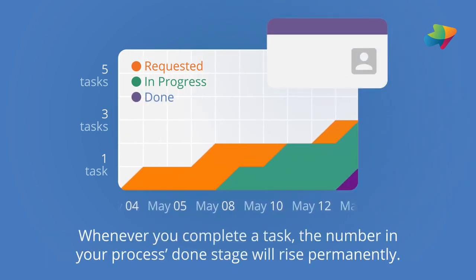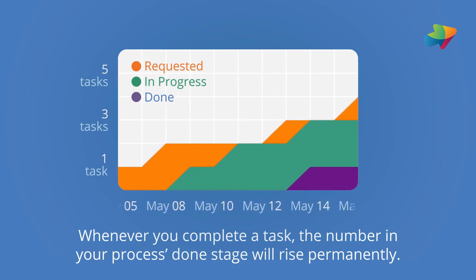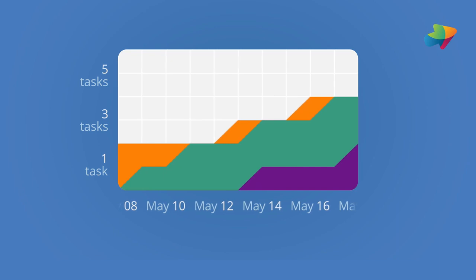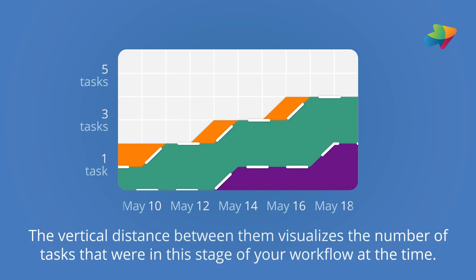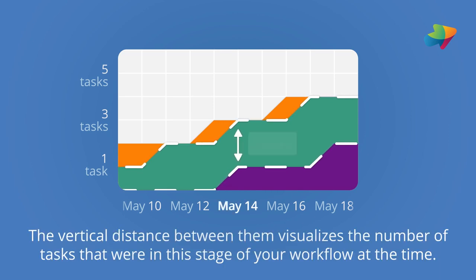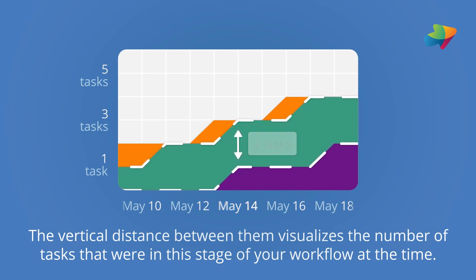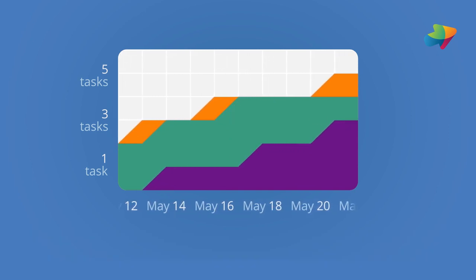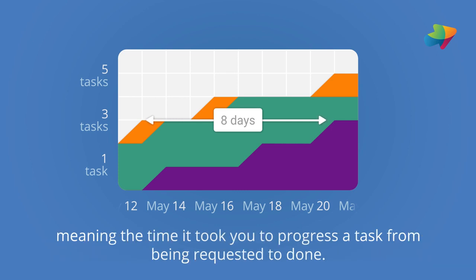Whenever you complete a task, the number in your process's done stage will rise permanently. Each stage has an arrival and a departure line. The vertical distance between them visualizes the number of tasks that were in this stage of your workflow at the time. The horizontal distance between your first and last stage shows the approximate average cycle time for your tasks — meaning the time it took to progress a task from being requested to done.